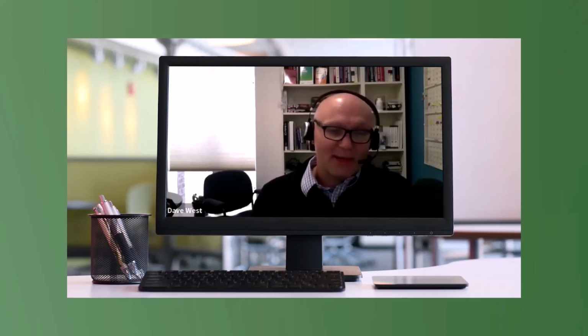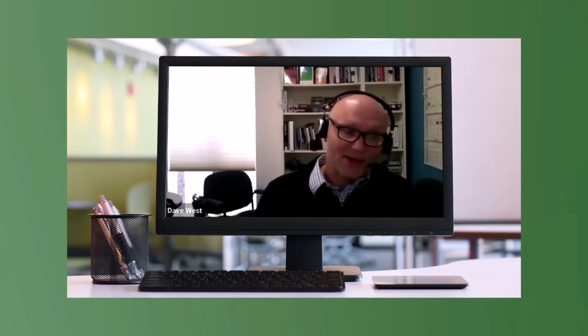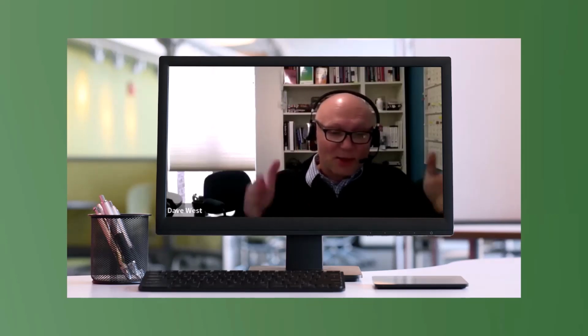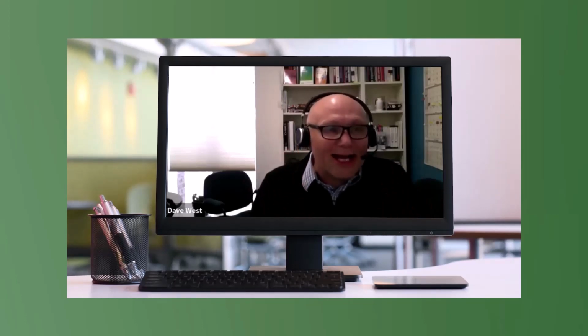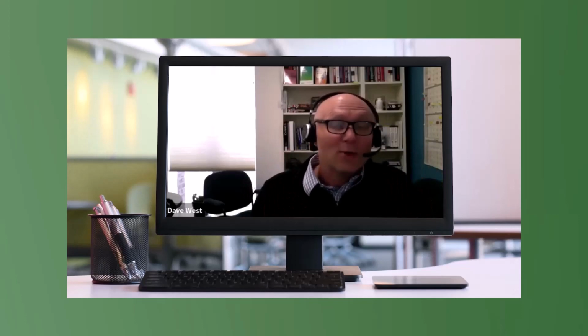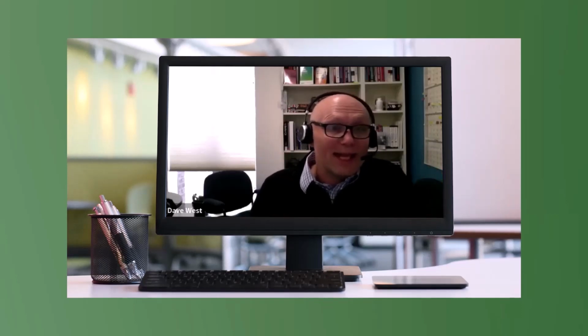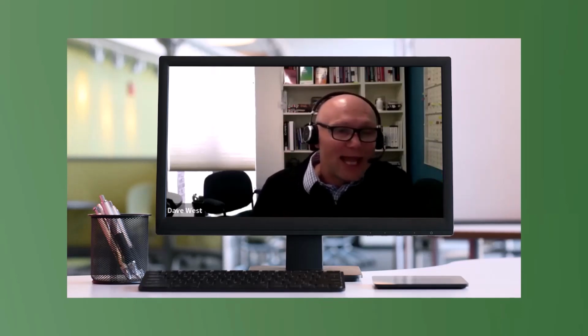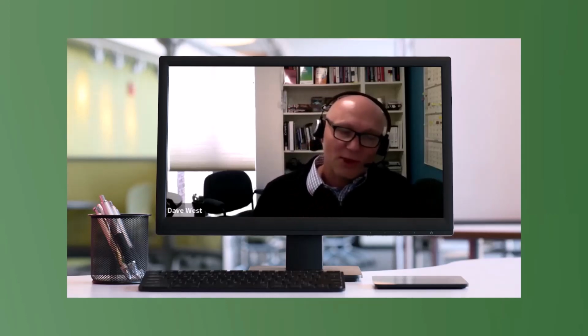A great Scrum team has a product owner that makes choices and makes decisions. Now, most organizations don't like that because it also means they're accountable for those decisions. But again, most organizations aren't going to fire you because of that. And the great thing about Scrum is you have these things called sprints. So it's only a small chunk of time. So what is it, a week or 2 weeks that you're wasting? If it is a mistake, instead of the traditional organizations where we spend months trying to make sure that everything's perfect before we move into the next phase.